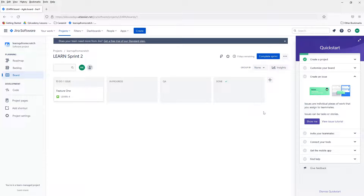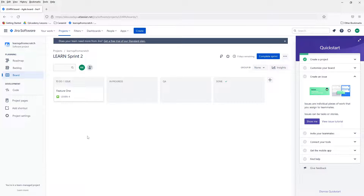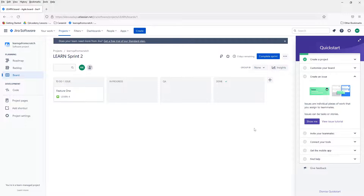You can also have swim lanes — a swim lane is essentially a separator in your board that stretches across all of the columns. For example, you can have a swim lane for software development and another for hardware development, or swim lanes for internal vs. external use, top revenue-making customers, or other types of customers. Swim lanes essentially divide your board by a specific set of end users who will receive the product, reflecting the differences in how it will be delivered.